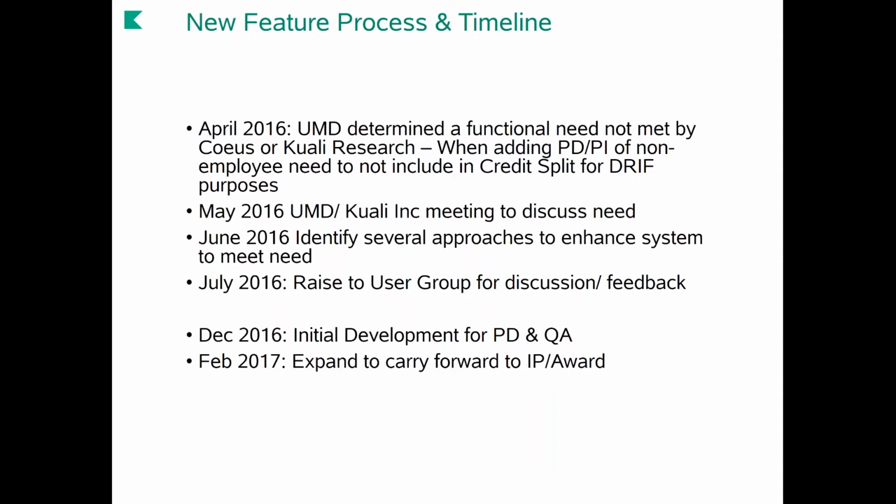But I think that raises the point here that you never know what's going to happen, and therefore it was very helpful that Maryland did identify this early in the process and did talk to us about their needs so that we could still meet their development and have that in place well before their go live in September of last year. So we did the initial development in proposal and did a QA process of that to make sure it was acting and behaving as anticipated, and then carried that forward into institutional proposal and award in February of the following year.